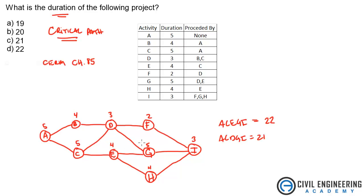And I think anything else will not beat that. So A, C, E, H, I. That's 10, 14, 18, 21. So you can see that nothing here is going to beat that. So this is the longest that the project's going to take.